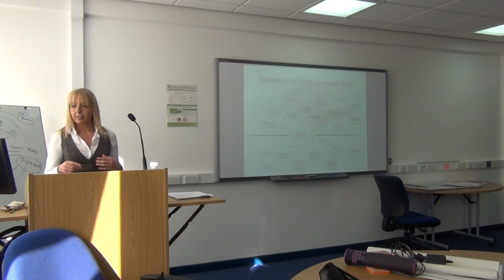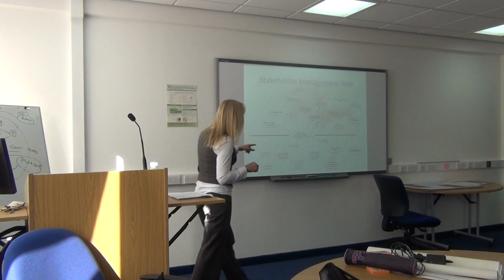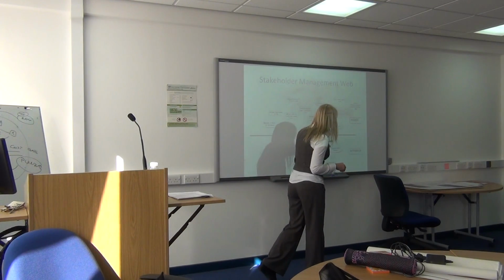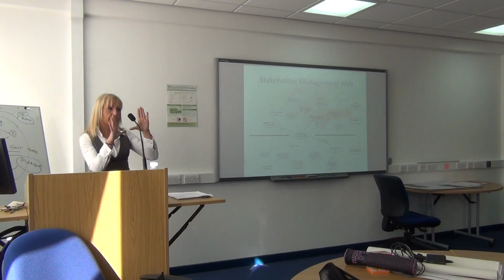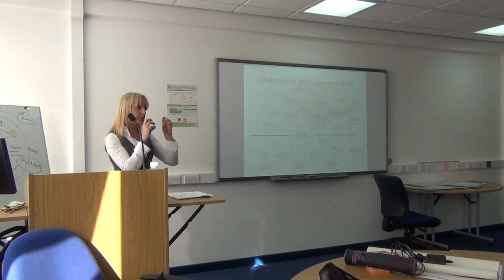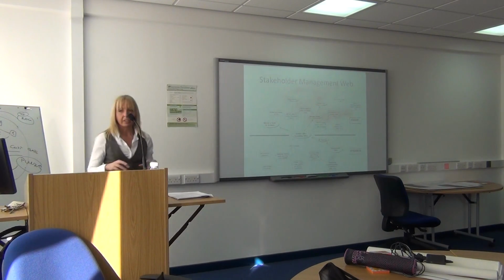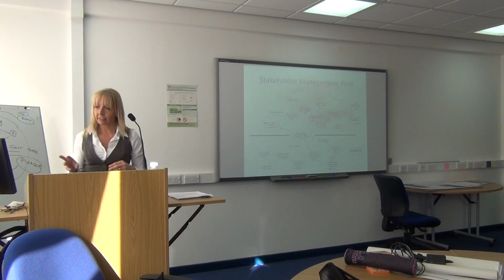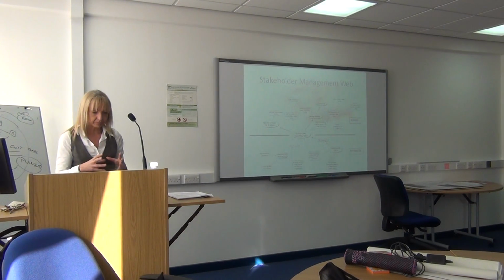The circles, the oval shapes, are taken directly from the power interest matrix in the same quadrant as the focused stakeholder here. So these are the people who have an impact on the decisions that this key stakeholder has.